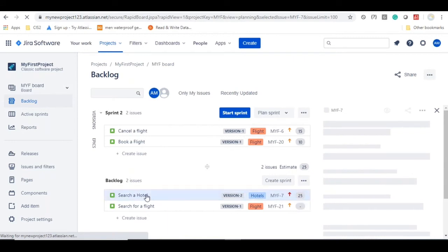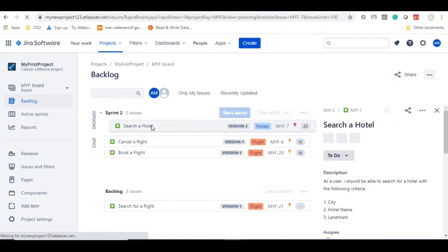So now the sprint planning 1 is over. So during the sprint planning 1, the team has estimated how much time each user story is going to take. So once they update that information, as a second step in planning 2 meeting, they are going to add the subtasks. So what is the use of subtasks? Who is going to add it? So subtasks are going to be added by the team members.